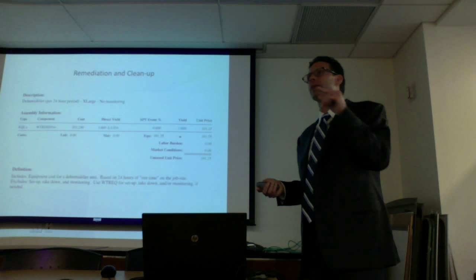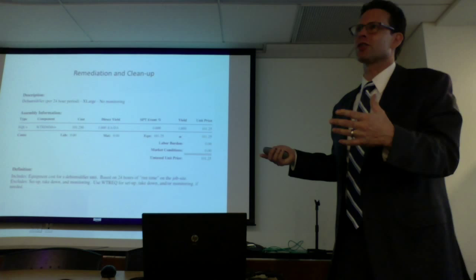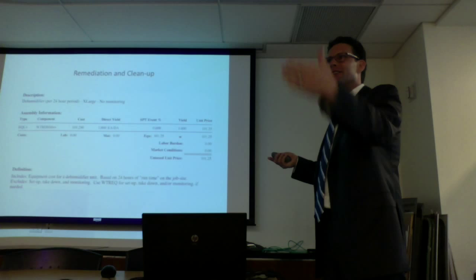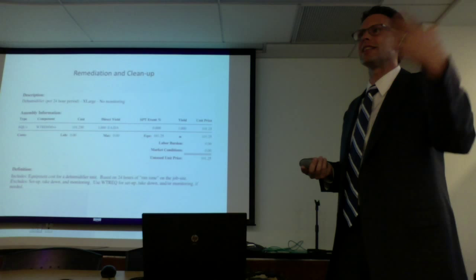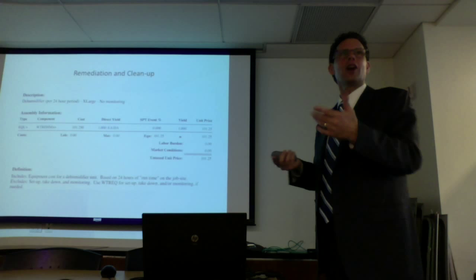They even have a line item. Now, the reason why this is separate is I do it per job. So I know there's 10 rooms, there's going to be this much equipment. It's the same guys. It's not going to take them much longer after taking 5 pieces of equipment off or 8 pieces of equipment, but they have to go there. And because nobody knows the amount of days that they're going to be on site, you separately calculate setup and takedown. The other thing is, at the end of every job, this piece of equipment that's in this nasty house gets cleaned. Xactimate has WTR decon to decontaminate, just to wipe it off. It's done by every contractor.